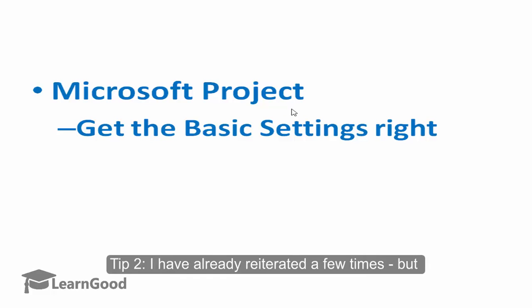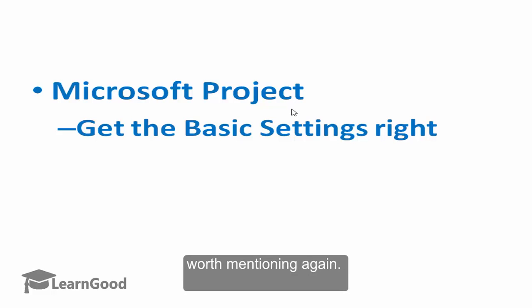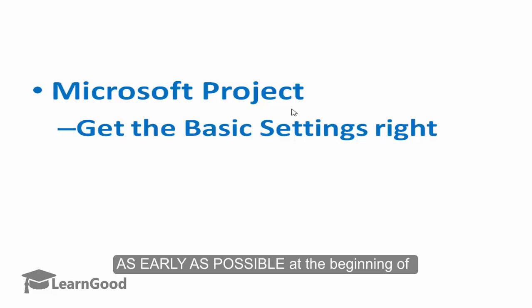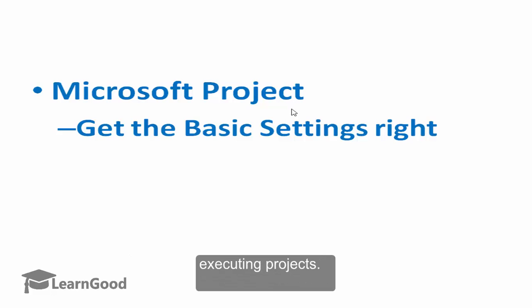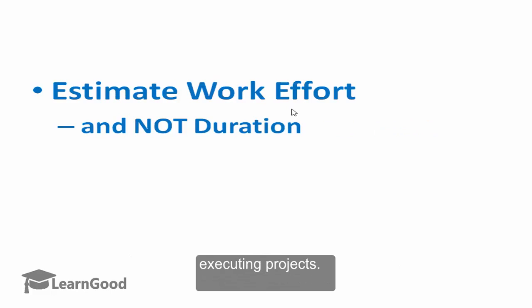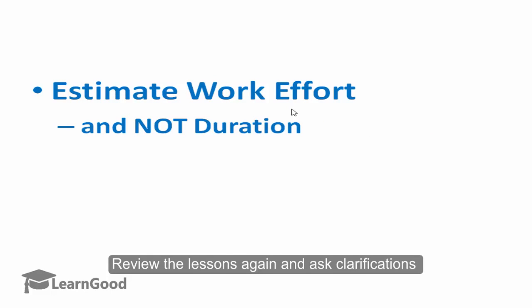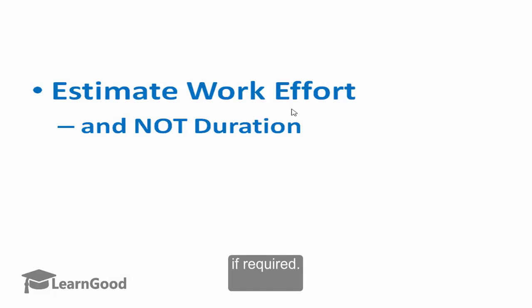Tip 2. I have already reiterated this a few times before, but it is worth mentioning again. As early as possible at the beginning of your schedule planning, configure the project calendar and use automatic task settings. These two things will save you precious time and effort at a later stage, for example, when you are actually executing the projects. Review the lessons again and ask clarifications if required.